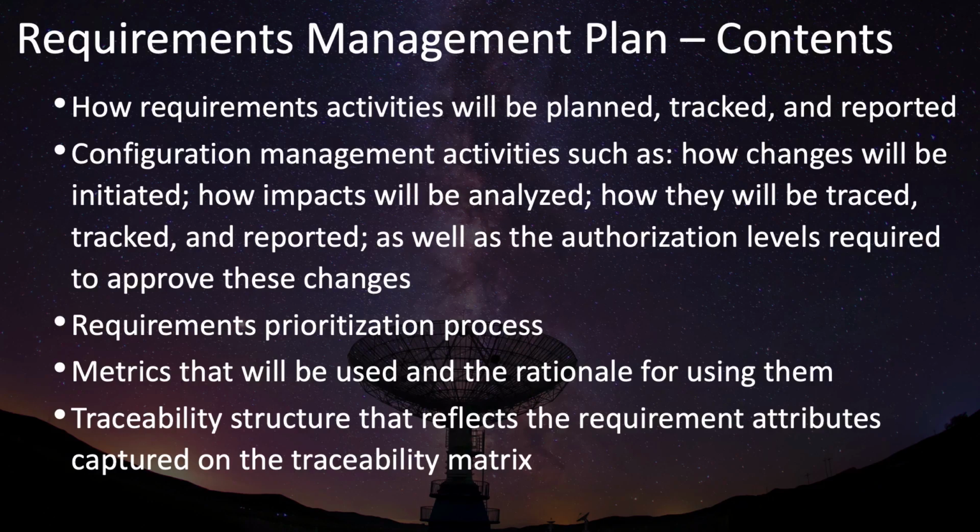So here in the context of the requirements management plan, it should specify how changes to the requirements will be initiated, how the impacts will be analyzed, how those changes will be traced, tracked, and reported, as well as the authorization levels that are required to approve any changes to the requirements.